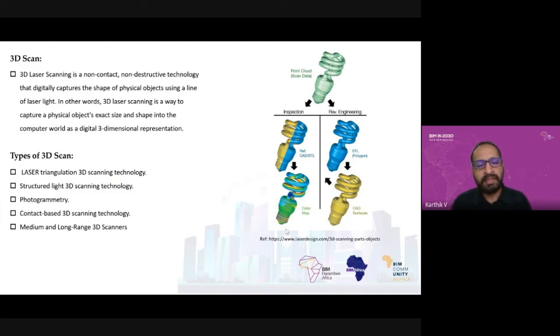So we clearly mention it. If your people are going to do the 3D scanning, you should remember this part. Anything hidden, any object that is hidden, if they want to scan that, they are the ones responsible to open and to close. It depends on the people. We are not the contractor, we are a BIM consultant, so we don't have the manpower to open and close and take all the risk.